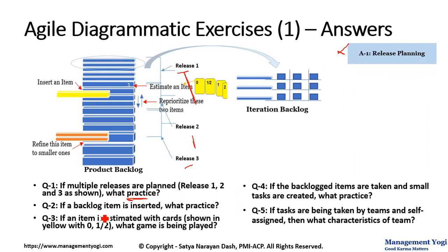Then if a backlog item is inserted, what practice? So we are inserting a backlog item here. This practice, or refining a backlog item, or estimating a backlog item, or reprioritizing the items, all these practices will be called as backlog refinement. That is answer number 2.